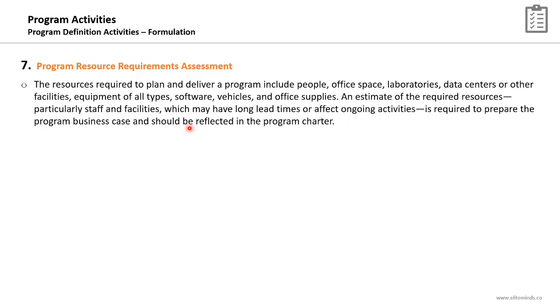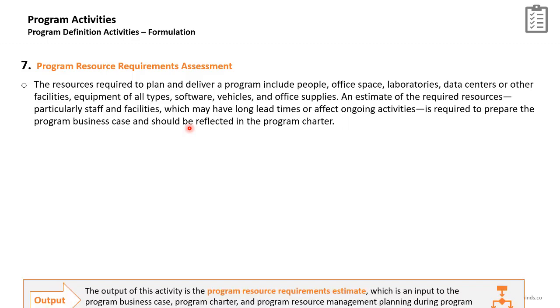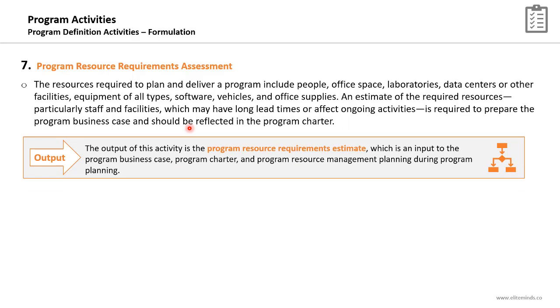So it's important to consider this assessment and have a high-level estimation of the required resources in the program, as this will be an important input to develop the program business case and the program charter, and it will highly impact the program initial cost estimation. The output of this supporting activity will be the program resource requirements estimate that will be an input to the program business case, program charter, and program resource management planning.